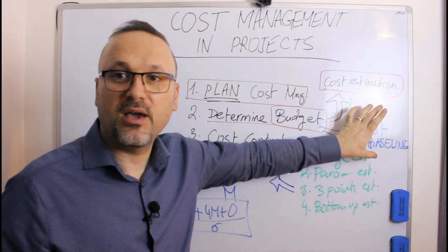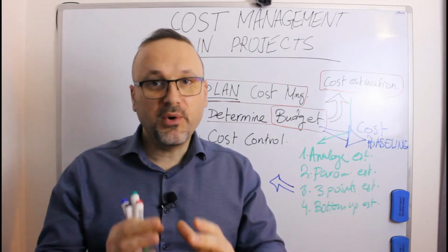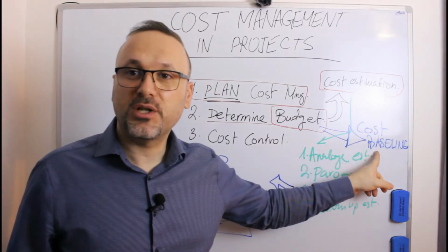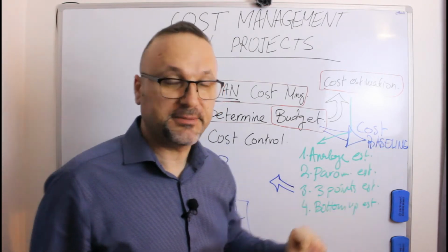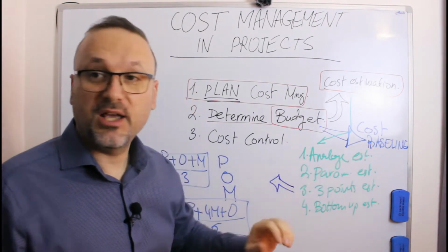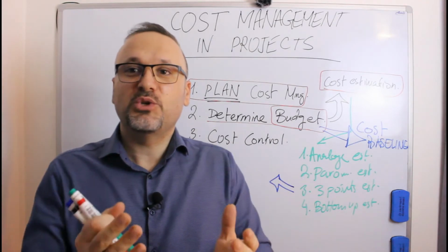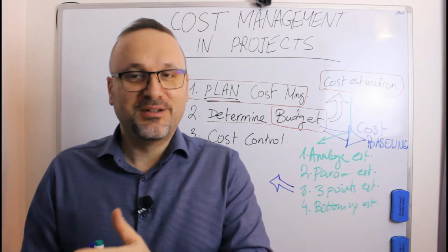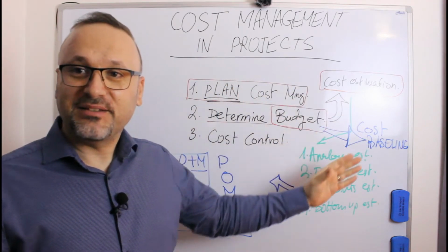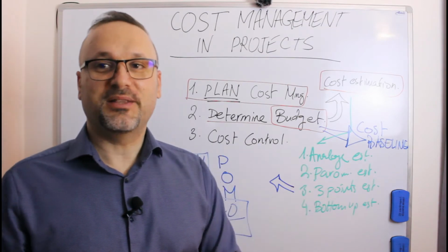Means I have to work with the cost baseline only. As a project manager, you work only with the cost baseline. Don't work with another thing unless you have change request for changing the cost baseline. Okay, once you have the cost baseline ready and you executed your project, you need just to control your project and check your project is in cost or over cost or below cost. Keep this in your mind for the next part, and we will go in details later for each one.